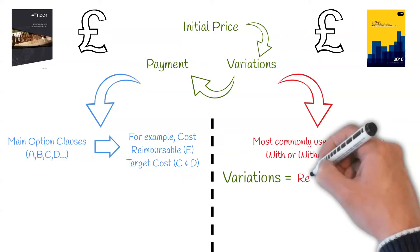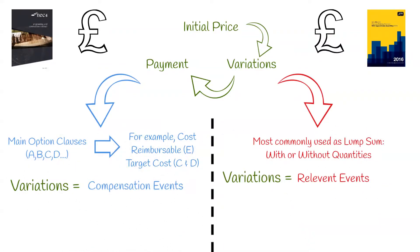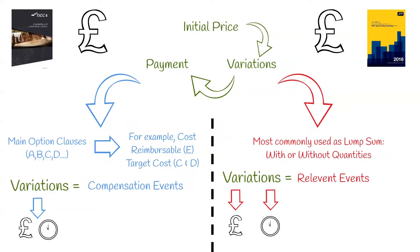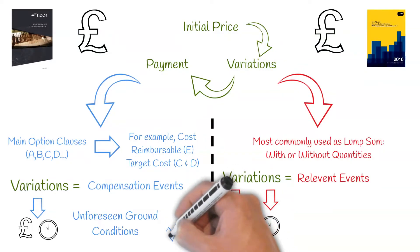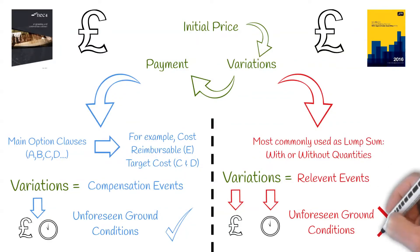Variations under JCT are known as relevant events, and under NEC they are known as compensation events. JCT deals with time and price variations separately, therefore an extension of time does not automatically guarantee a price adjustment, unlike the NEC where both time and cost are grouped together under the compensation event. For example, unforeseen ground conditions which an experienced contractor could not have foreseen is a valid reason for a variation under NEC; however, this risk is carried by the contractor under JCT.